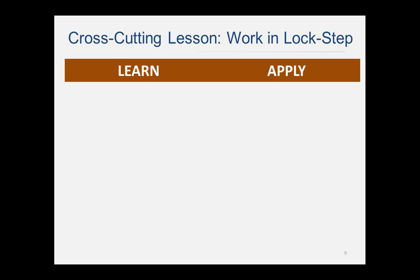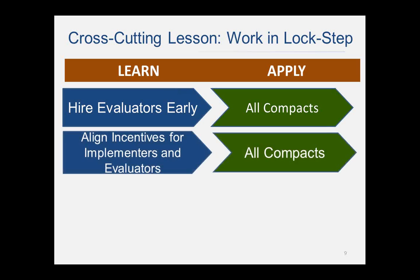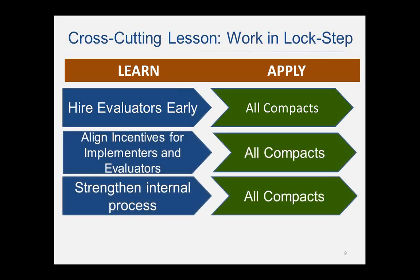It's a learning process. Just when you think you get it right, you wish you tweaked that contract slightly. And finally, we need to strengthen the internal MCC process to ensure the program design and implementation team is working with the evaluation team on evaluation questions, quality control, and dissemination of evaluation results. This is really about understanding who should be around the table, ultimately understanding our users and when — those key milestones in an evaluation when it's critical to check in, assess status, and course correct if necessary.